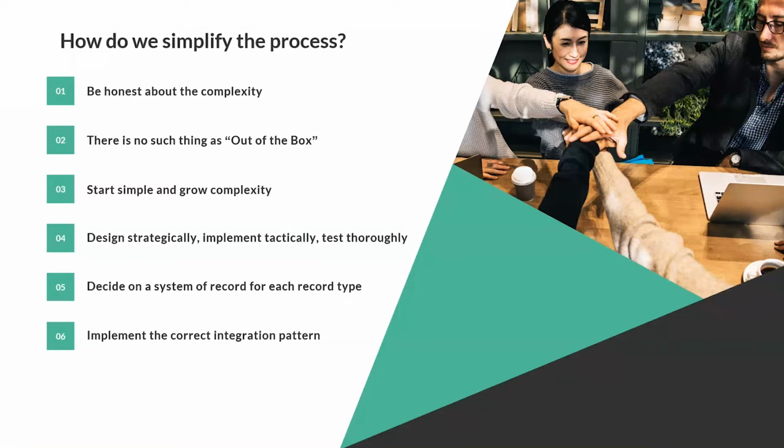Get into it. Look at some of the data. Do some analysis to make sure you understand where your null records are, where your different pick list values are, where things can just be manually entered. Really understanding that data is going to help you to design in a good way.